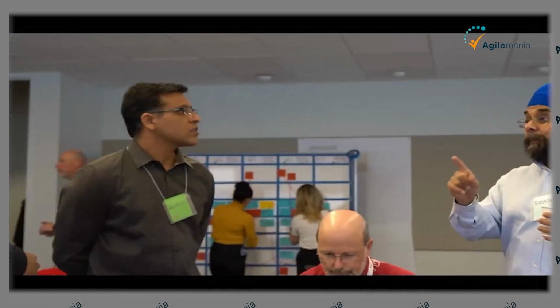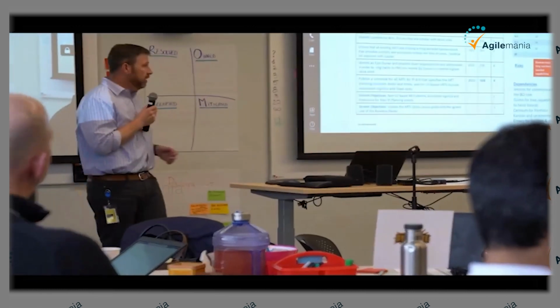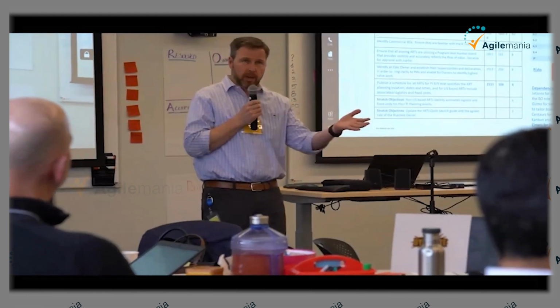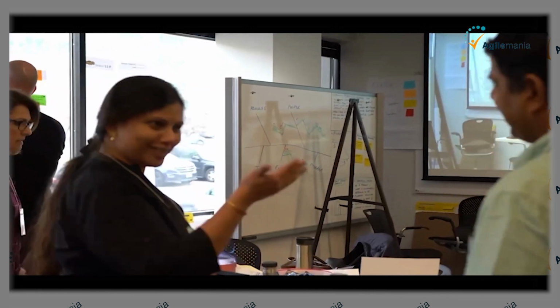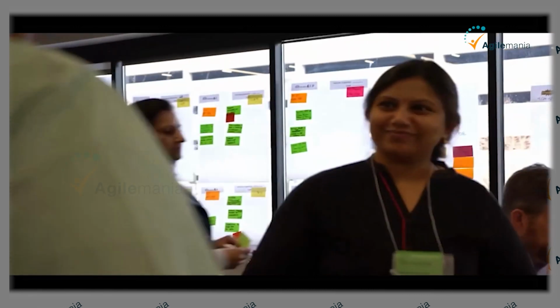We had our business owners come to us and say, look, I know that we have all these commitments, but one of our primary customers has asked us to make a change. We said, okay, what are we taking off the plate of the teams? Because we can't do it all, and SAFe tells us we can't do it all. They agreed that there was work that could be removed. We went back to the teams and told them, A, you're going to get started on this, go ahead, we're good to go. B, you're going to remove X off of your plate. They looked at us and were like, wait, what? We don't have to do it all?